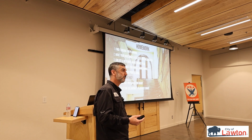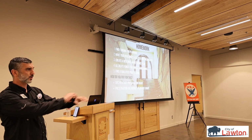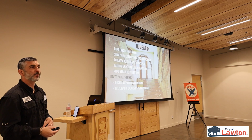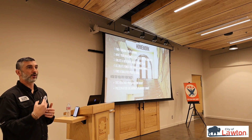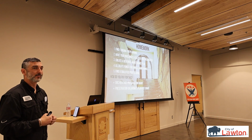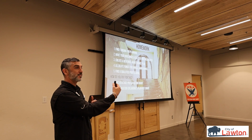Create a deferred maintenance plan. This is something that we did for the Harn Homestead. They have 8 buildings that transcend territorial Oklahoma. And we went through each of their buildings and created a list on each building. Is it a critical repair, or is it a low thing that we need to keep an eye on and do? But now, once we have the deferred maintenance list, we can start checking these things off the list